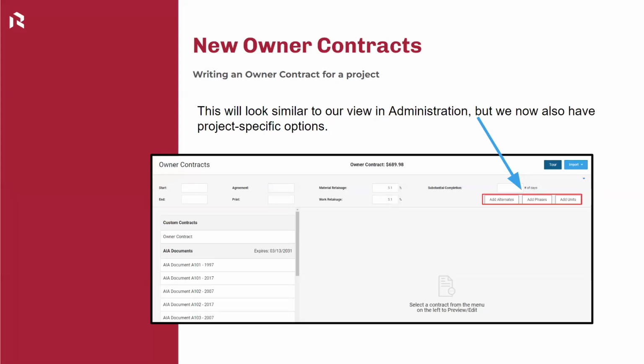When you're in bidding, you can build your bid for one studio apartment, one bedroom, 1 bath, etc., and everything that goes into each one. So all the drywall, all the electrical, plumbing, flooring, just all the stuff that you need to build one studio apartment. Then all you have to do is, when you click on add units here, you can indicate that we're going to build 40 studio apartments. It will do the math for you and again adjust the contract value accordingly.